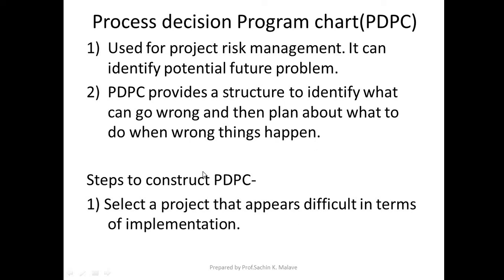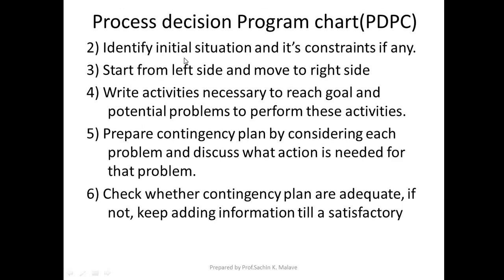Okay, so steps to construct a PDPC. Select a project that appears difficult. So select a project, identify the initial situation and its constraints. So identify the situation and try to predict the constraints or the problems, what can go wrong. Start from the left side and move to the right side.